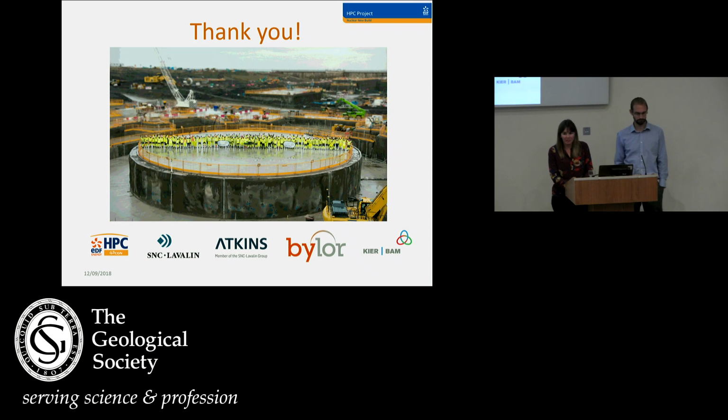One of the procedures for material reuse is that the stockpiles are stockpiled separately, particularly the Westbury, and it's stockpiled and exposed for up to 6 months in order to naturally let the pyrite weather out before it's processed and reused. Weather in 6 months? Sorry? It won't fully weather in 6 months.